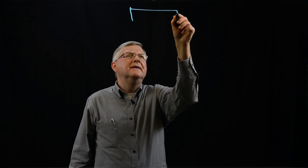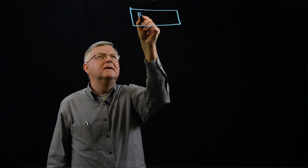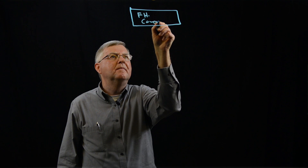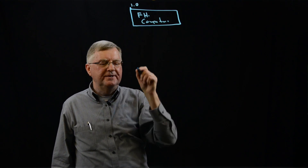Now I'm going to create a very simplified five-level work breakdown structure for formula hybrid. We can assume that the project manager has completed the process of segmentation on the particular project that's being planned, and this is going to depict the pieces of that segmentation and how they fit together. Level one is simply the formula hybrid competition — call this level 1.0.